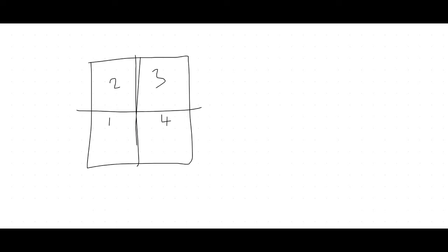One of the terms we use is the budget at completion, BAC. To give you an example, imagine each quadrant of this wall was budgeted to cost $10. What is the total budget for this project? $40, right? That's your budget at completion. Budget at completion is just the amount that you would spend at the end of the project that you're budgeting right now. Project hasn't started, it's just a budget.